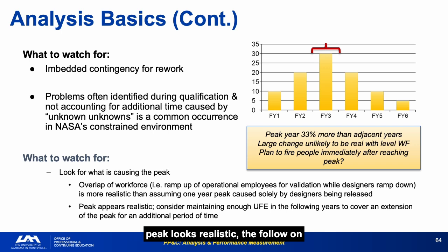If the peak looks realistic, the follow-on question is whether there is enough UFE in the years after the peak to cover an extension, because extending the peak is almost always what actually happens. The peak period is where programs most commonly underestimate cost. If the plan is tight here, reserves need to be sized accordingly.